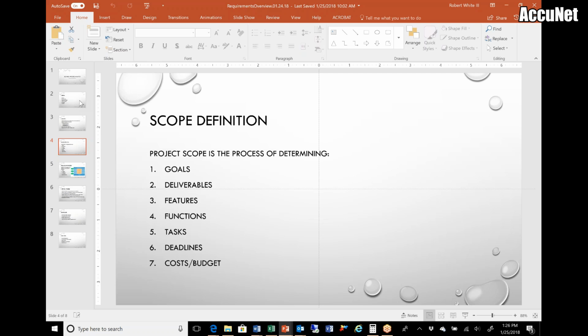And then 6, project scope or deadlines. I talk about the rails and scope. Deadlines do in fact come into play very heavily. So if you have deadlines that we're trying to meet that are way too short and unrealistic, then the approach might be taking a project into a multiple phased type project where you may dwindle down your scope. That scope would then allow you to meet that original deadline and then have another scope that would go beyond that deadline. What are the pieces and the give and take of a project? What are those? And defining that with the deadlines with a customer.